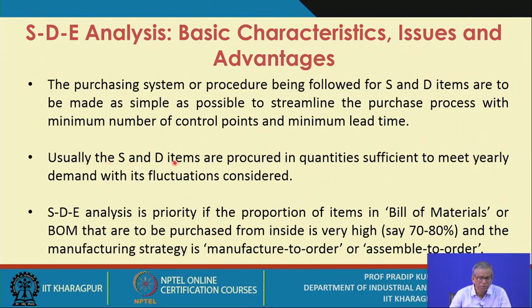Usually the scarce and difficult to procure items are procured in quantities sufficient to meet yearly demand, with fluctuations considered. That means the purchasing procedures, particularly for imported items, are cumbersome, and you need to follow the entire procedures with several control points meticulously. In the majority of cases, it is a time consuming process.